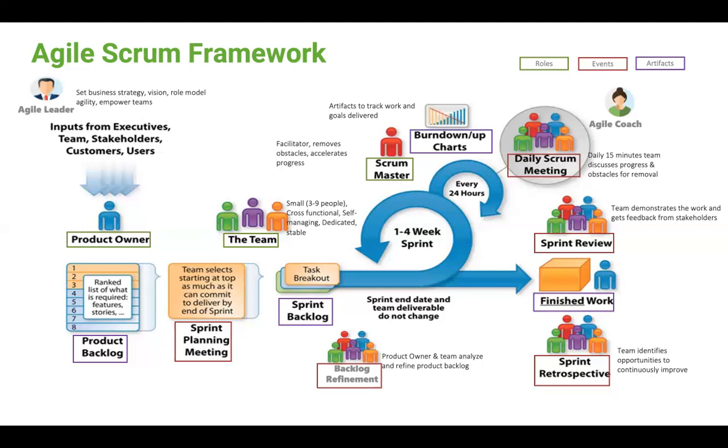sprint, then the team would have what we call the sprint review. And it's at the sprint review they'll be able to showcase the work they've done. This is finished work. And when they get approval, all right, that's when they'll say, well, fantastic, we finished that. And then they can put it where they want to put the rest later. Okay?